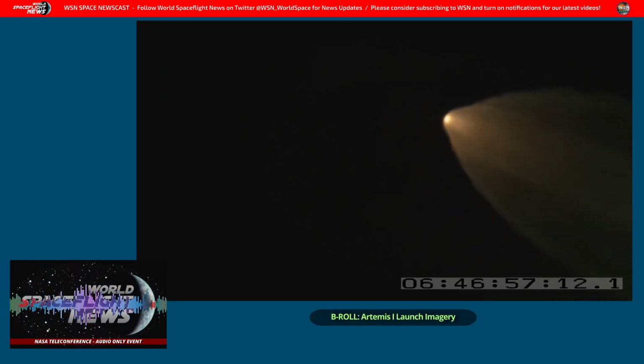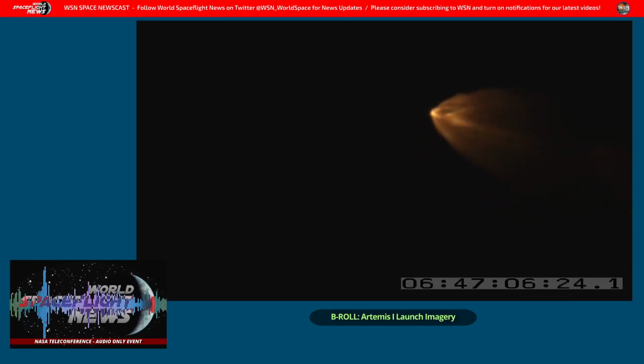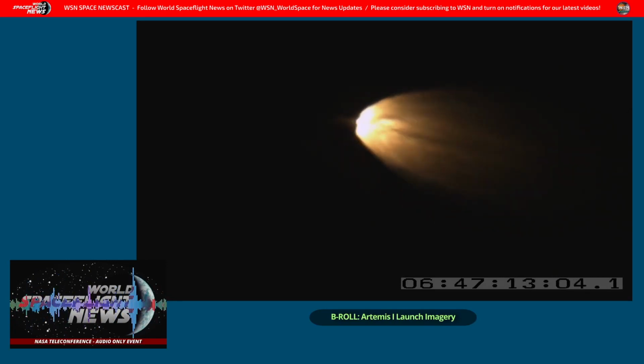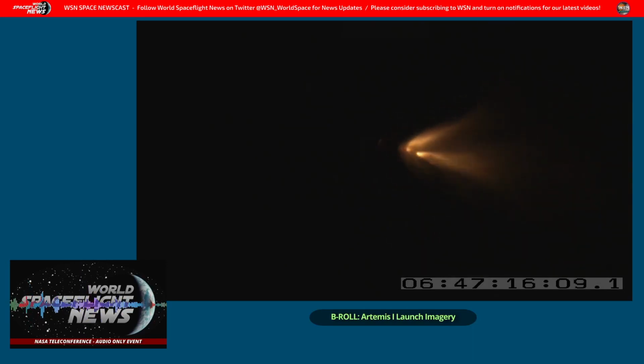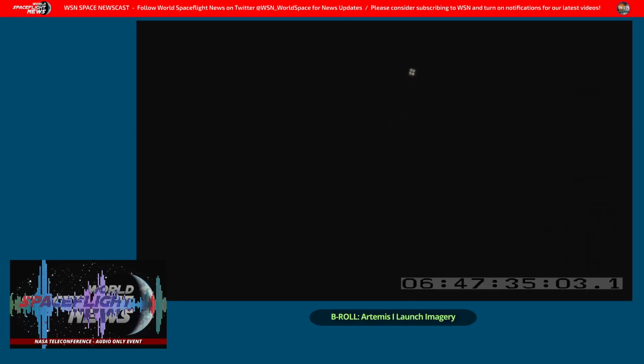And then for the boosters, we've got the booster segments in storage. We'll be able to ship those when KSC needs them. We'll have them there in time for that. For the forward and aft skirts on the boosters, we've got those in place at KSC. We'll start doing the testing on those in time to support integration with EGS, and we've got ICPS in storage at ULA's integration facility for Artemis II, and then our structural adapters in the OSA and LBSA are ready to go.